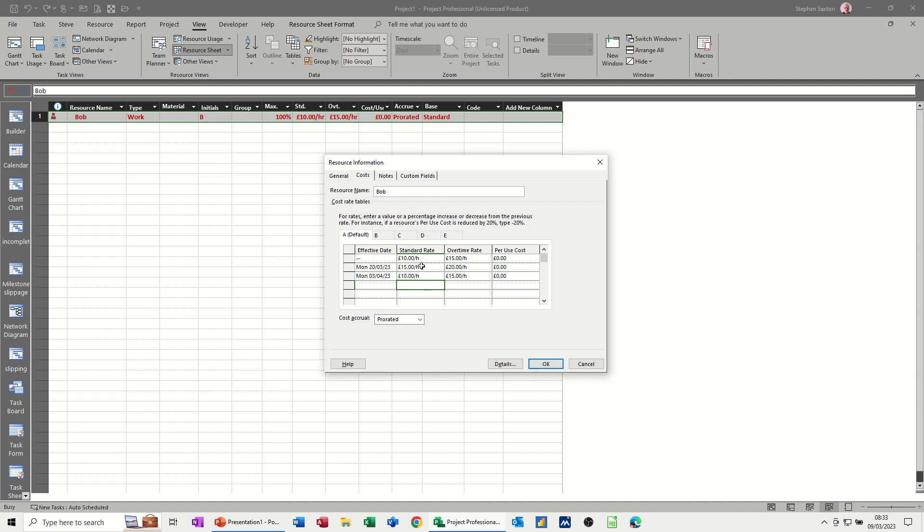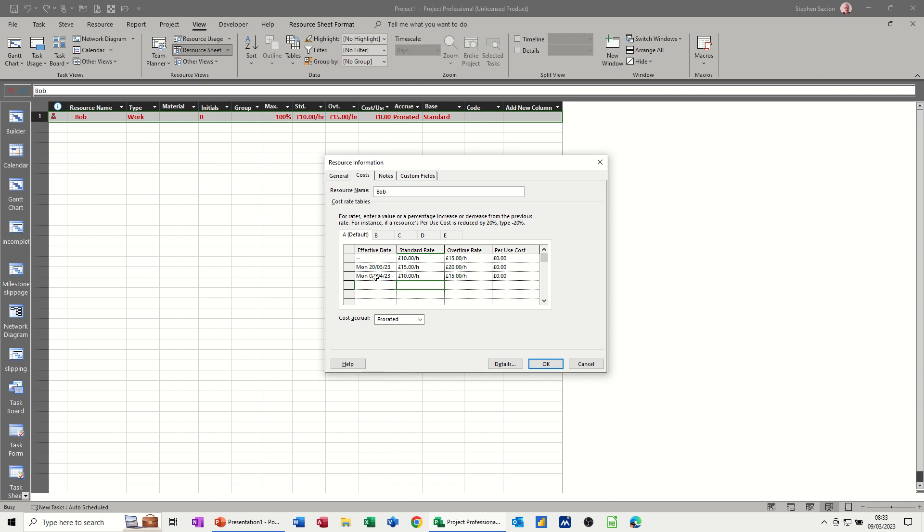Now, that happens quite often in government agencies when civil servants go overseas into a war zone to support the troops or something like that. They will get extra money during that period on top of their normal rates like danger money. So they would get it during that period and then they'd revert back as soon as they came back to their normal working practice. But that's how you would do it in the cost sheets under resource information.